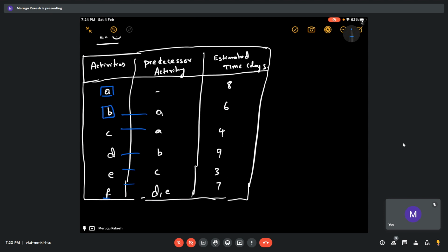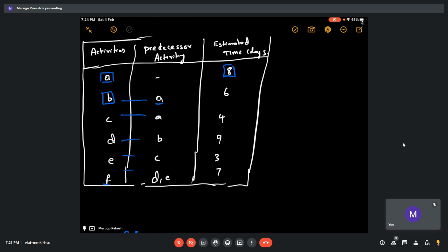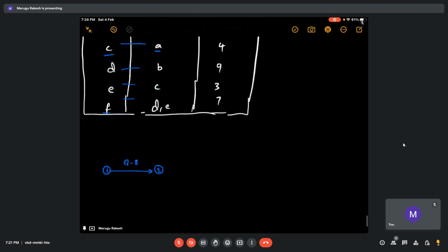These are activities, A, B. They have a duration, so it should be on the line. I will start with event one, directly to event two. This duration is 8 days. Okay, that is activity A. Next, this is the precedence relationship of A for B, and it is also for C. So there is a branch coming out from event 2 like this. This is 3, and this is B, and this is 4, and this is C.